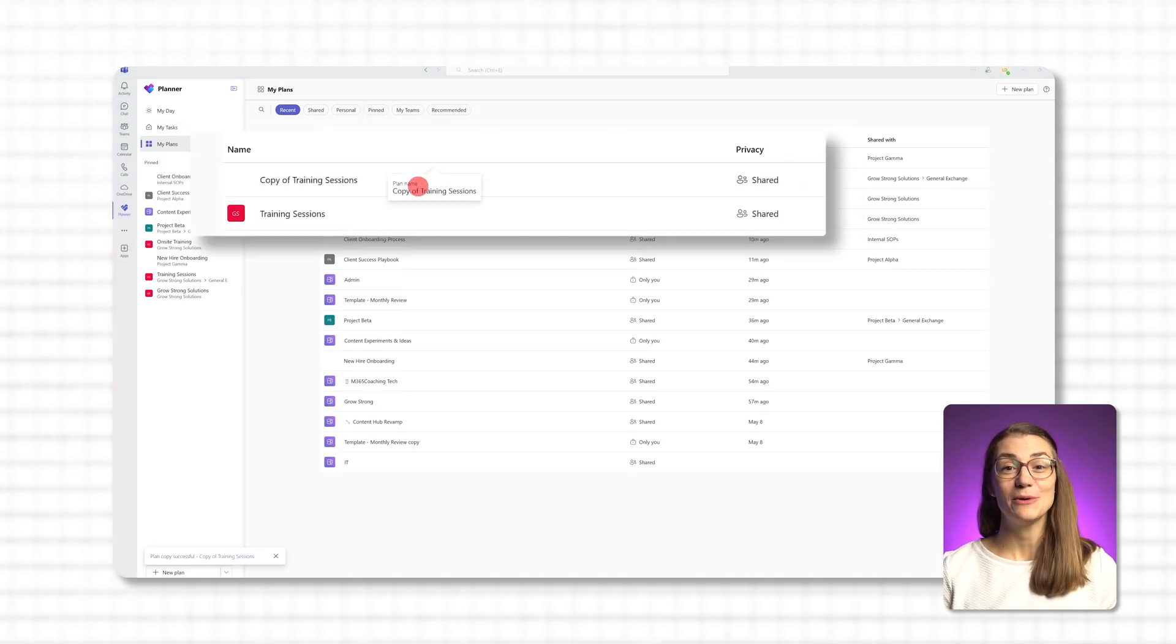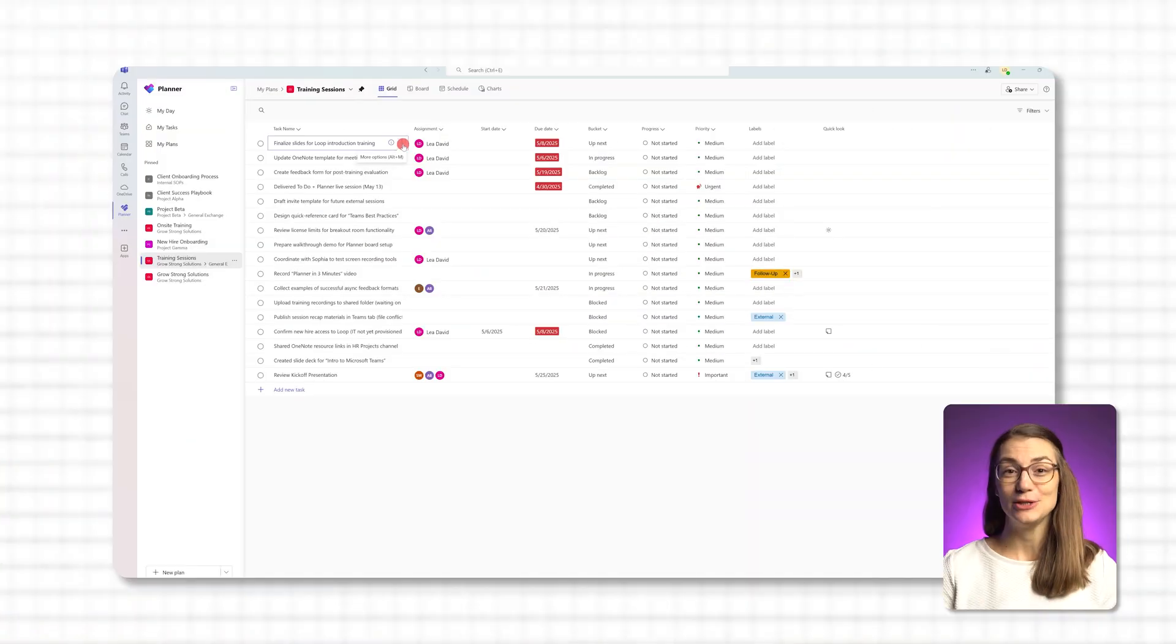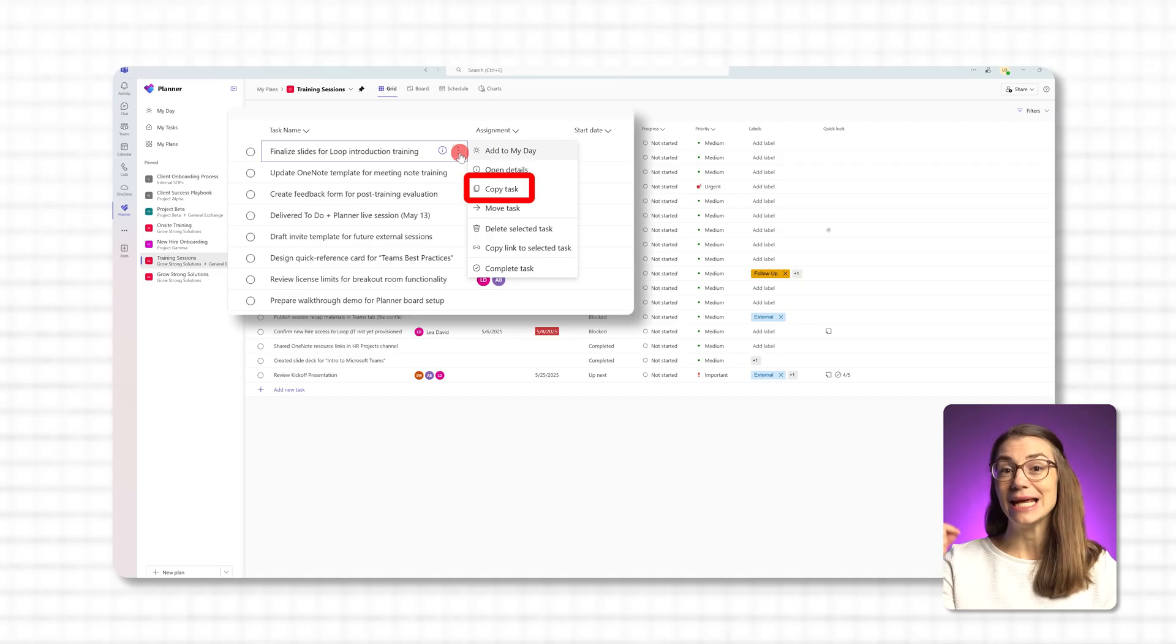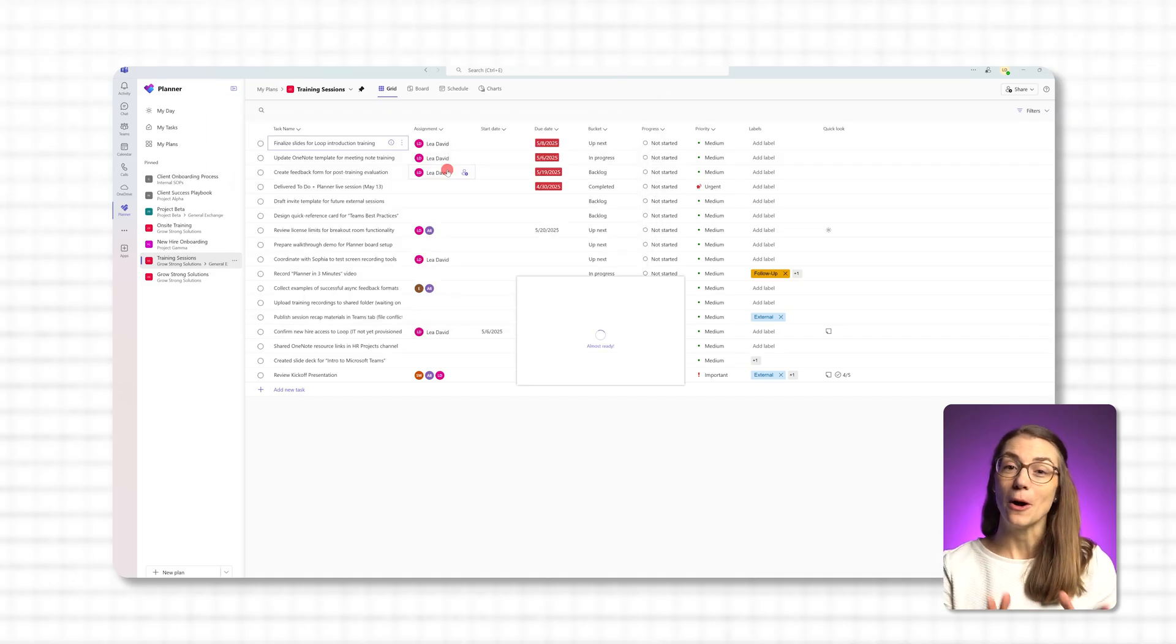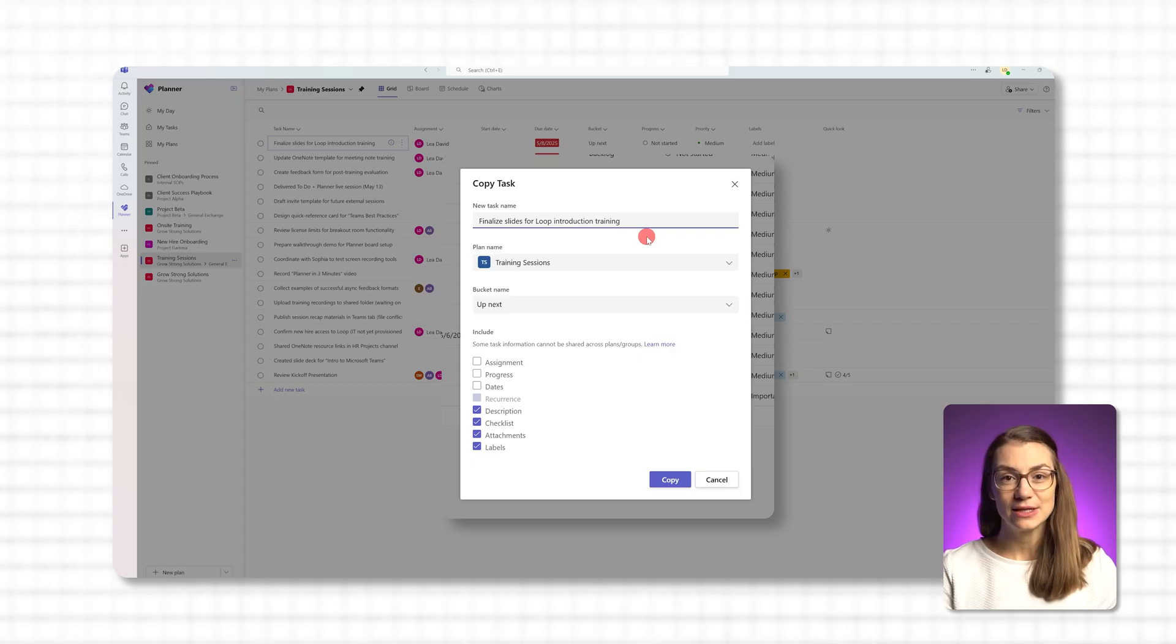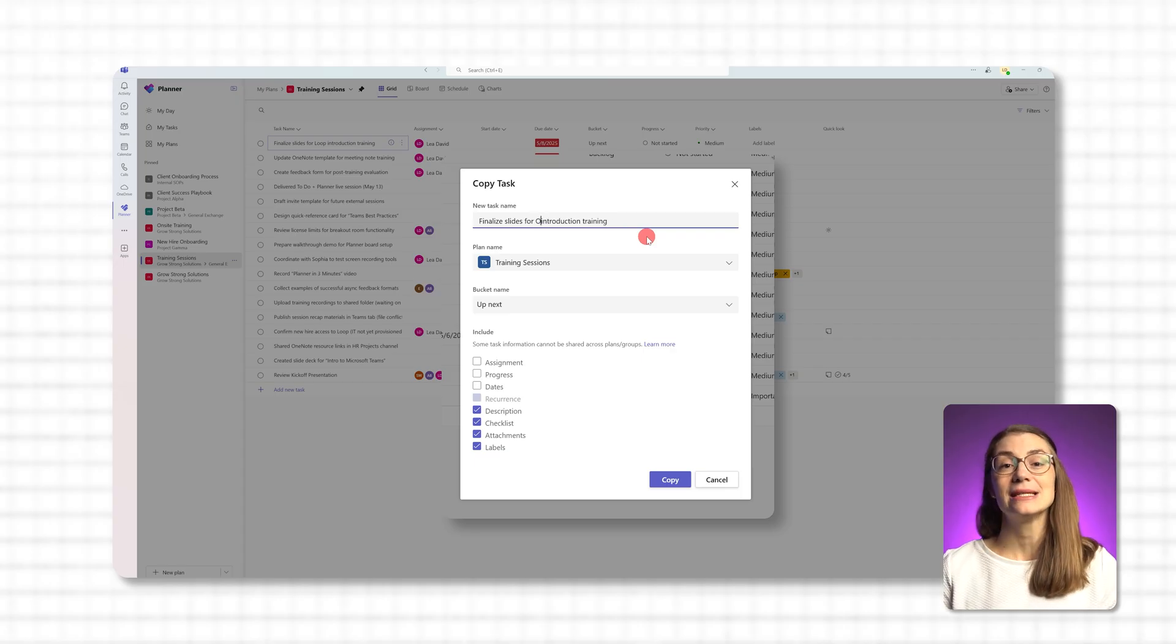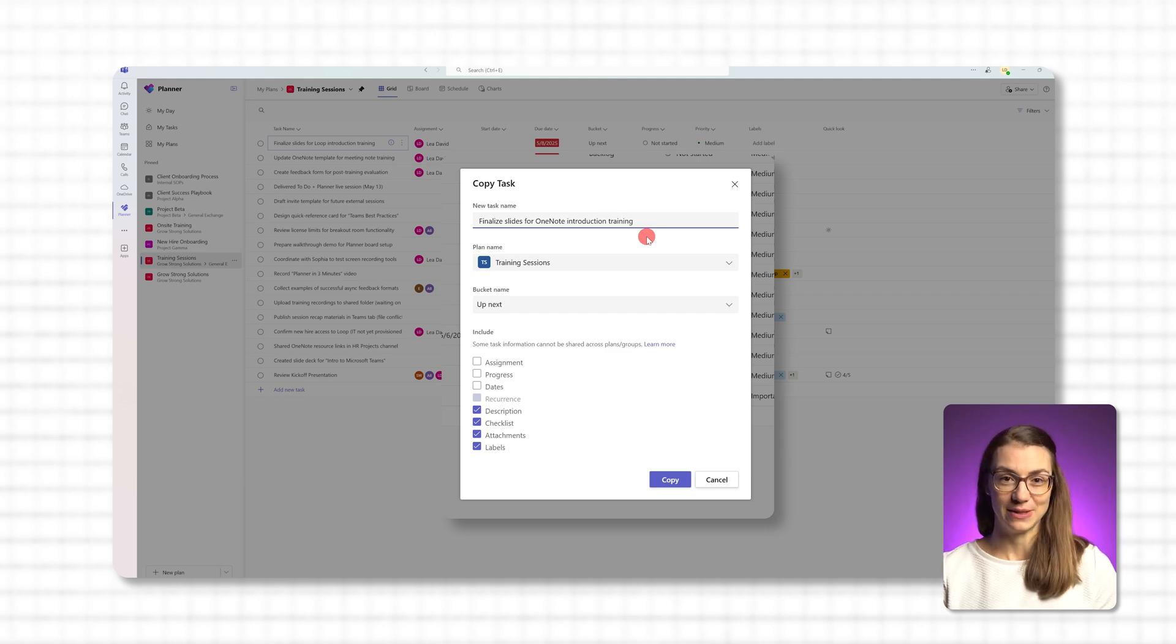And here's a bonus tip for some additional saved minutes and clicks. If you don't need the full plan structure and just want to reuse a specific task, that's easy too. Open the task you want to duplicate, click the three dots in the upper right corner of the task window and select copy task. You'll then be able to rename the task, choose which plan and bucket it should be copied to, and select what to carry over again like checklists, notes or attachments.